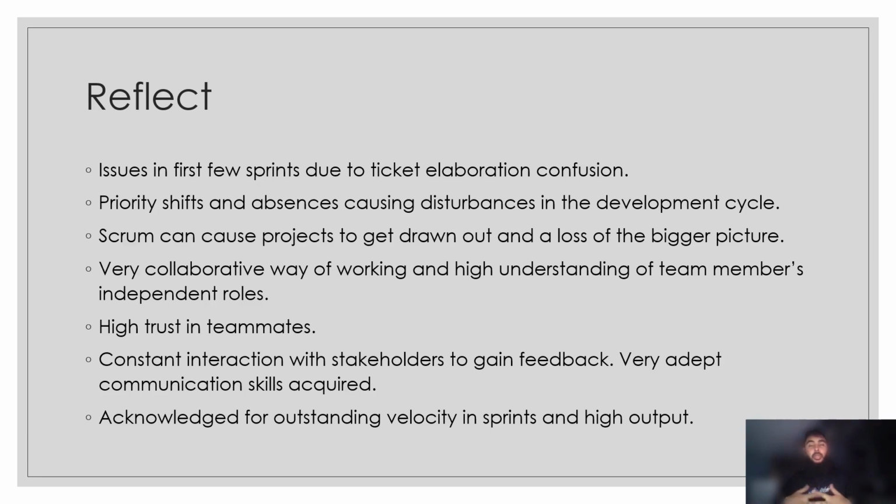And so the project was getting drawn out, and we were constantly thinking, let's upgrade, let's do more, and adding to the project, and not really thinking about, okay, well, we have 6 months to deliver something. We have to give a viable solution, and so that meant that obviously we sort of lost sight of the bigger goal and the bigger picture, and we were sort of falling behind on deadlines a little bit at one point.